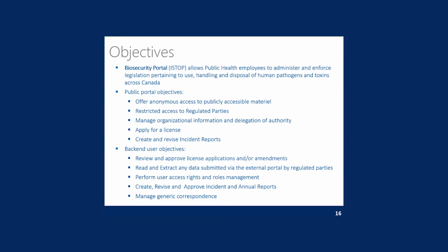What is important to say is that it took about 4 to 5 man-years to develop. It was 3 developers working full time, and then there were developers coming in and going out of the project. But I would estimate it at 4 to 5 man-years of development, so it's pure development, without the requirements gathering and other people that were also part of the project. I'm mentioning that because, as I said, this is not an out-of-the-box solution. It was using ADXstudio portals, but it was quite extended.